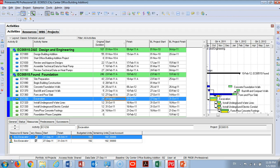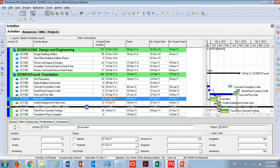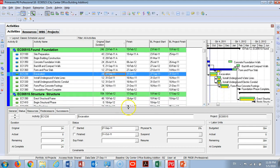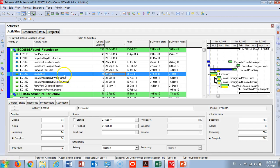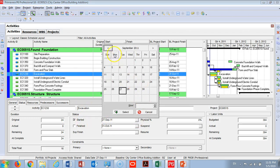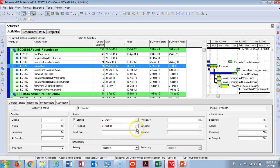Let's go to the live software. I'll go to the Excavations activity and then to the Status tab — this is very important and is what you use to update your schedule in a regular update. I'll choose this activity because it's not yet started. You can see the start date is September 27 and the end date is October 31st. I'll enter an actual start — by the way I'll use end of August — and I'll change the remaining duration to 30, based on the remaining work and remaining resources.